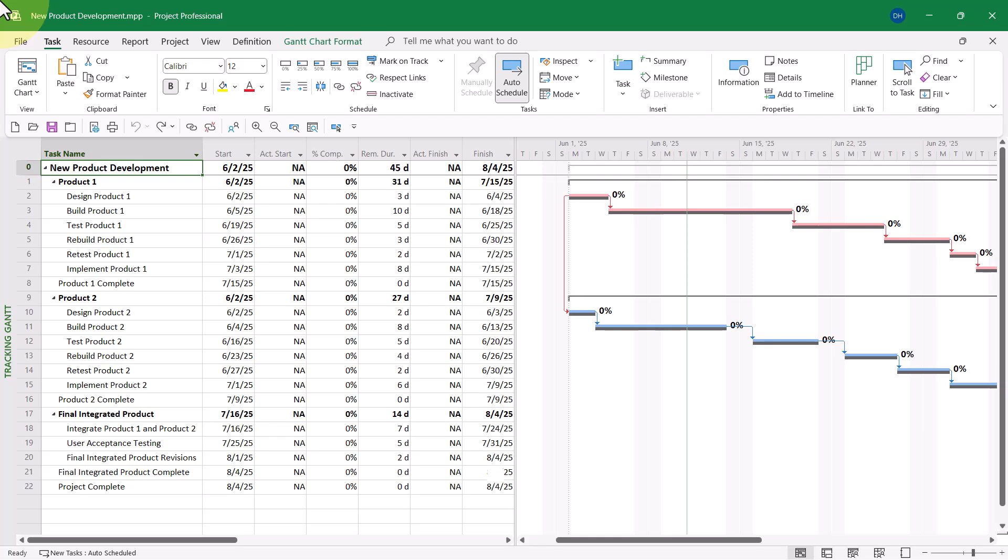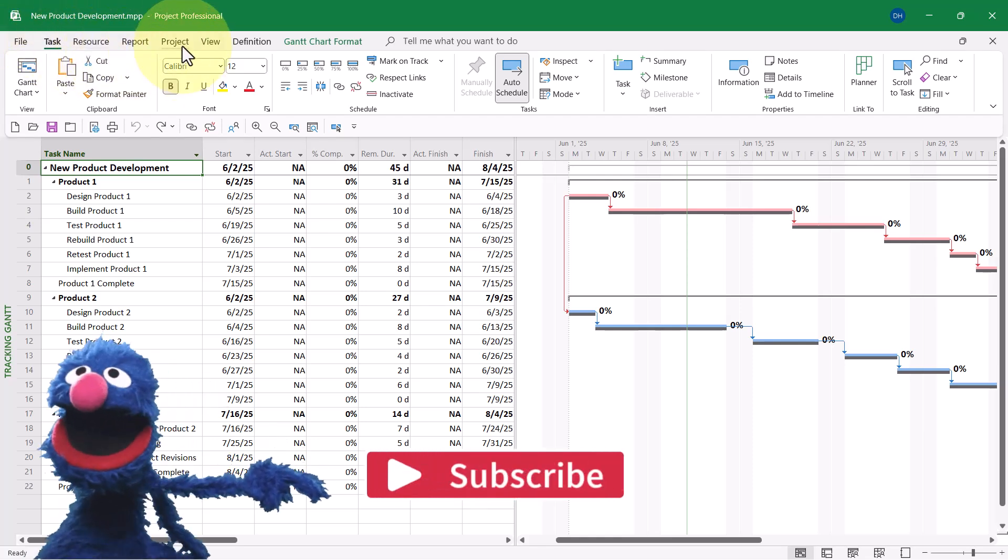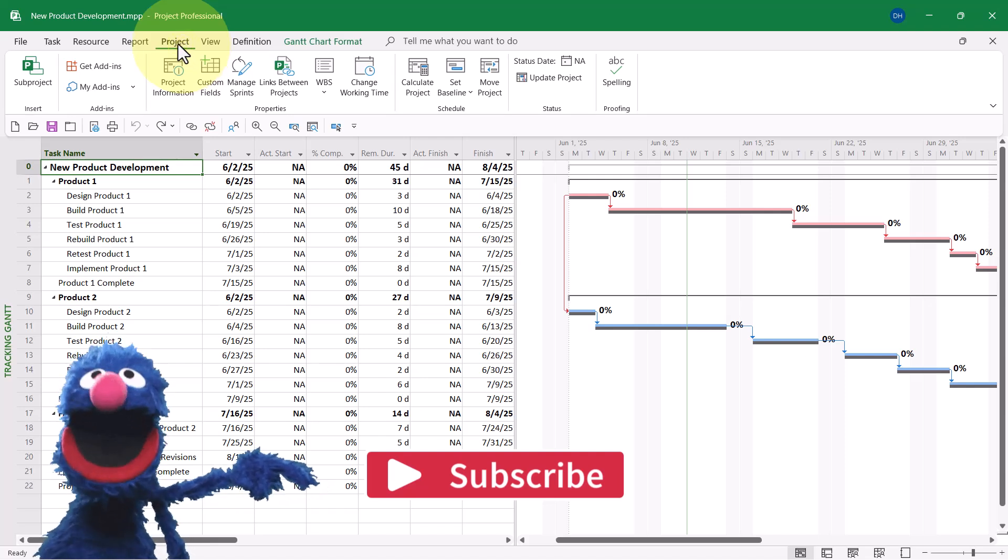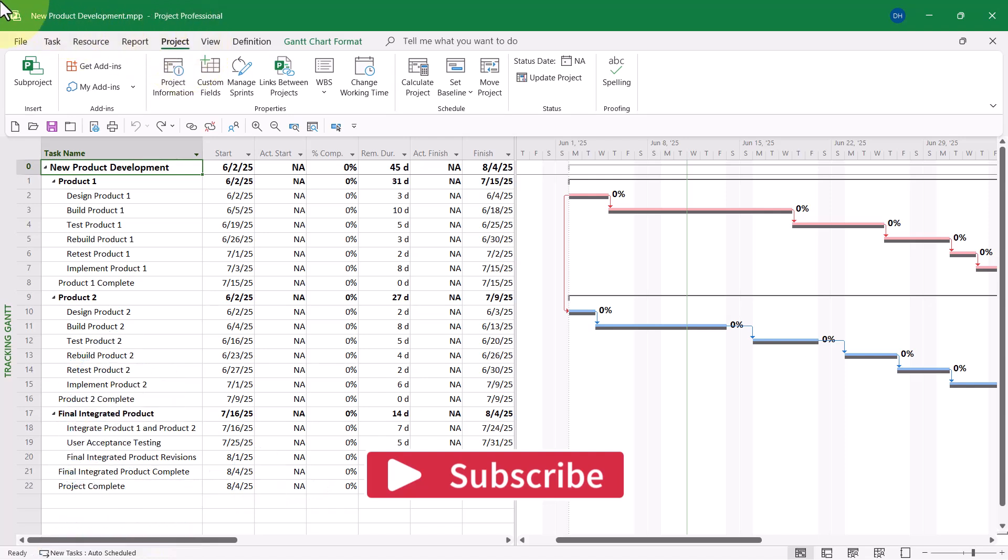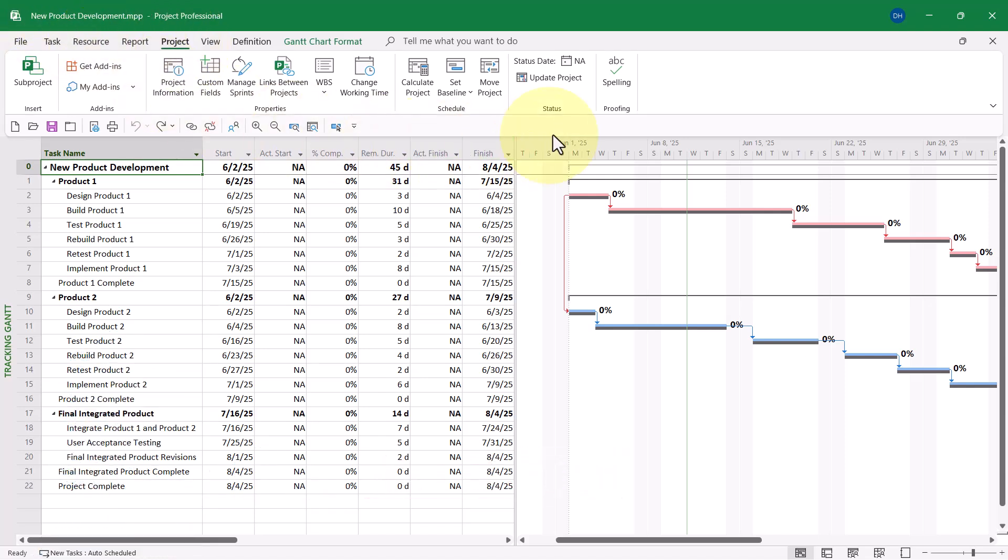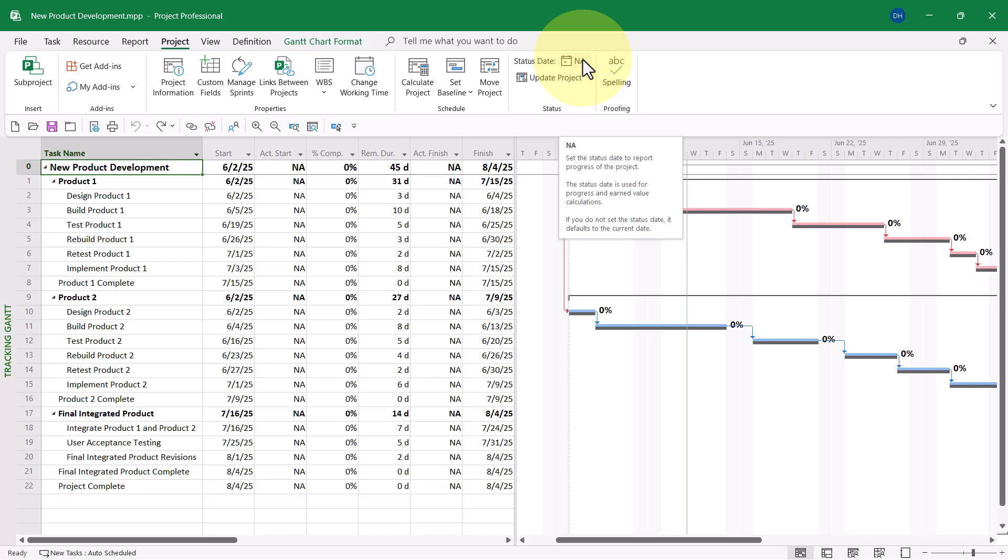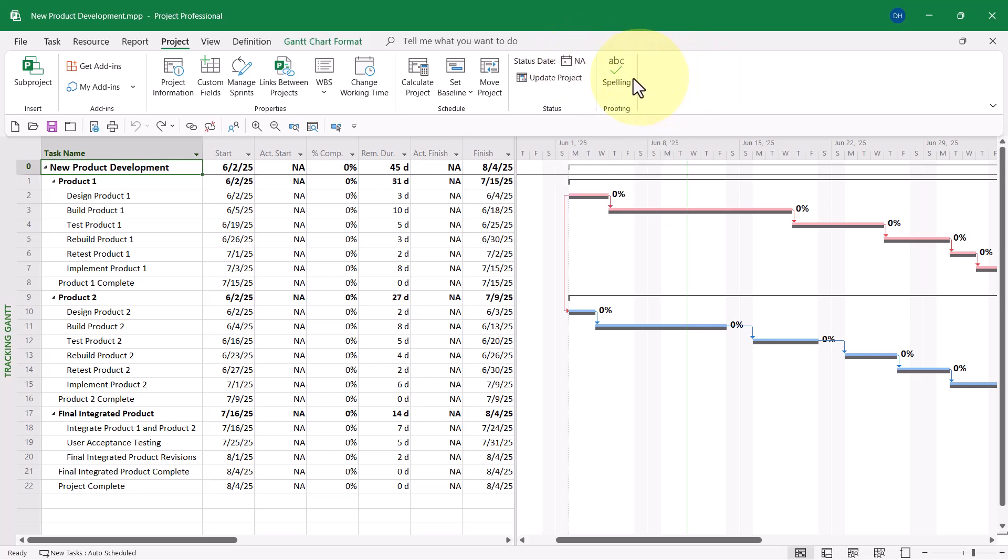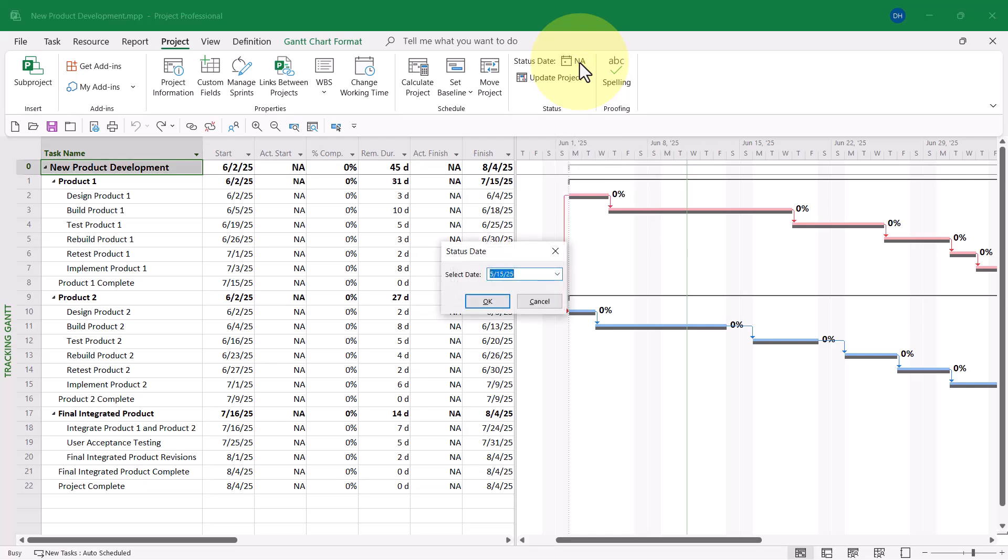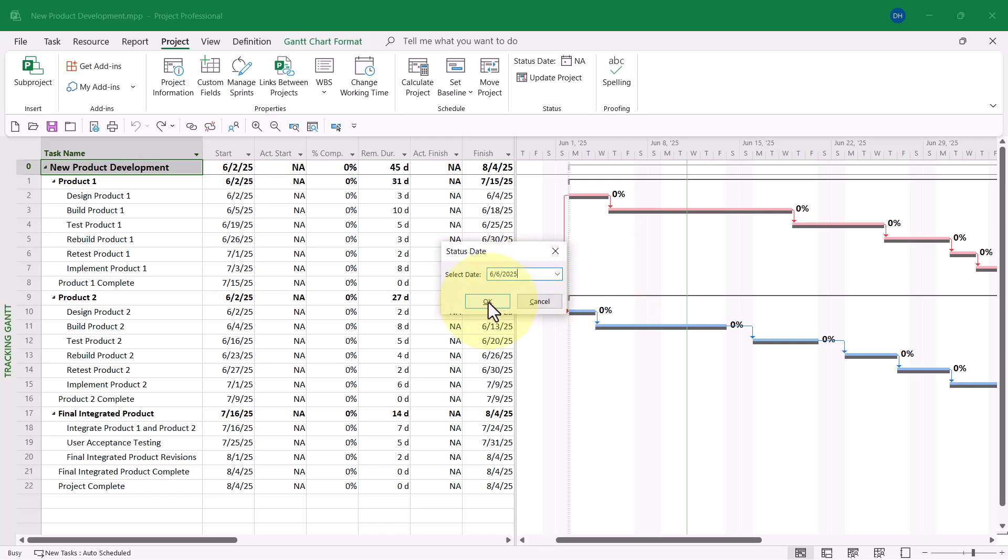So, here's how to set the status date. Click the Project tab to display the Project Ribbon. And then over in the right end of the ribbon in the Status section, you'll notice there's a Status Date button where the default date is NA. Click the Status Date button, and then enter the date that will be the status date for your project. In my case, that will be June the 6th. Then click the OK button.